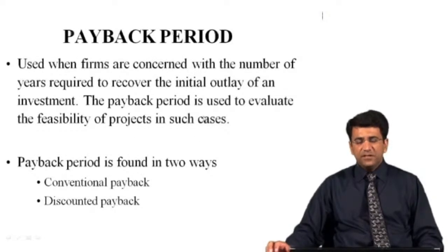There is another concept related to the financial analysis of projects, that is the payback period. A payback period is that period in which the principal amount of the project, or the capital investment of the project, is recovered after the generation of revenues. If your initial capital investment is recovered in 2 years, it means the payback period for that particular project will be equal to 2 years.